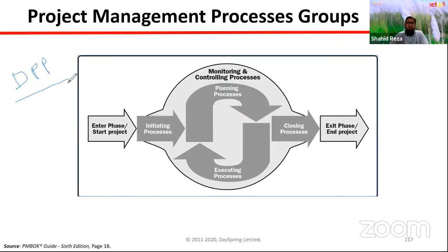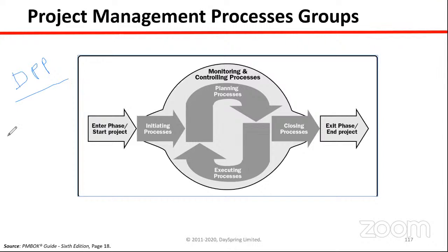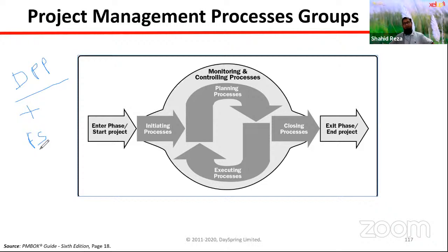Right. So we sometimes make a feasibility study before the project, and the feasibility study forecasts cost benefit ratio, situation analysis, even NPV, IRR, everything. Project components, project outcomes, and costing, everything is proposed there.